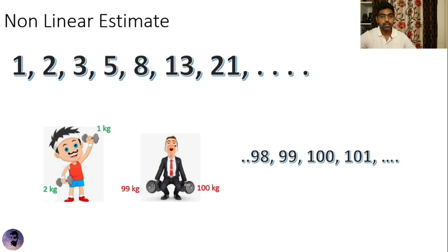So linear estimates tend to be not of much usefulness when calculating efforts for higher weights, because it does not add the material weight into the estimates. So that's the reason non-linear estimates came up. This kind of technique is called Weber's law, and Weber's law is applied to these non-linear estimates, and we came up with user story points 1, 2, 3, 5 and 8.